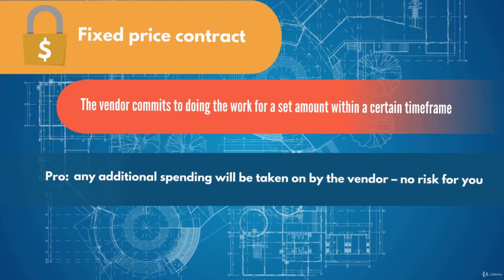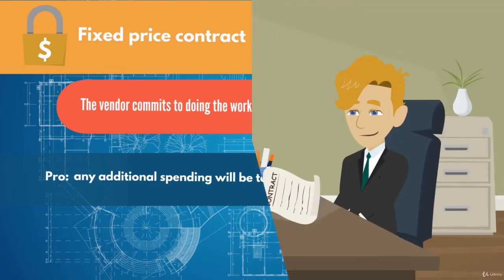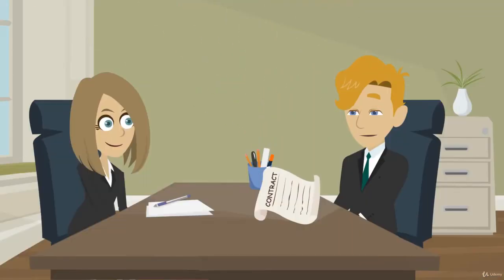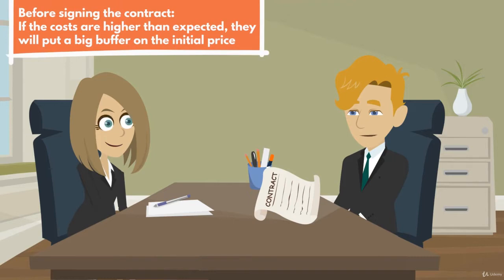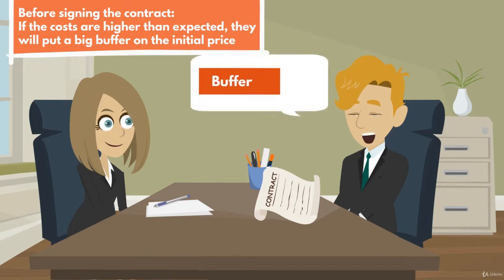The pros of this is that any additional spending will be taken on by the vendor. No risk for you. Perfect. Or is it? You see that they are aware that with this kind of contract, if the costs are higher than expected, then they will incur losses. Therefore, there is a chance they will put a big buffer on the initial price.